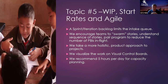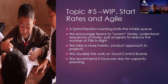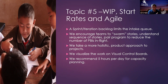When we talk about work in progress in agile and Scrum: one way we reduce WIP is by creating a smaller sprint backlog. If I have 100 items on my backlog and put 10 into my sprint backlog, the highest WIP I could have is now 10. If I were in waterfall, it could be 100. But that's not enough — we shouldn't be taking 10 stories and having everybody working on all 10 simultaneously.